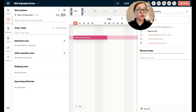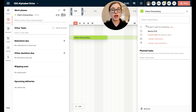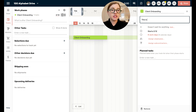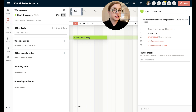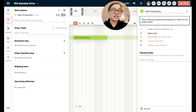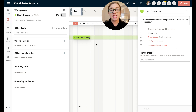I'll click client onboarding and you'll notice on the right client onboarding pops up. This is where I have some capabilities to change the color of the bar on the visual side. I can add a description here — so this is when we onboard and prepare our client for the project start. It's not going to wait on anything because this is the beginning, and then I can say when it starts. I can also set how many work days I want — let's say four working days.